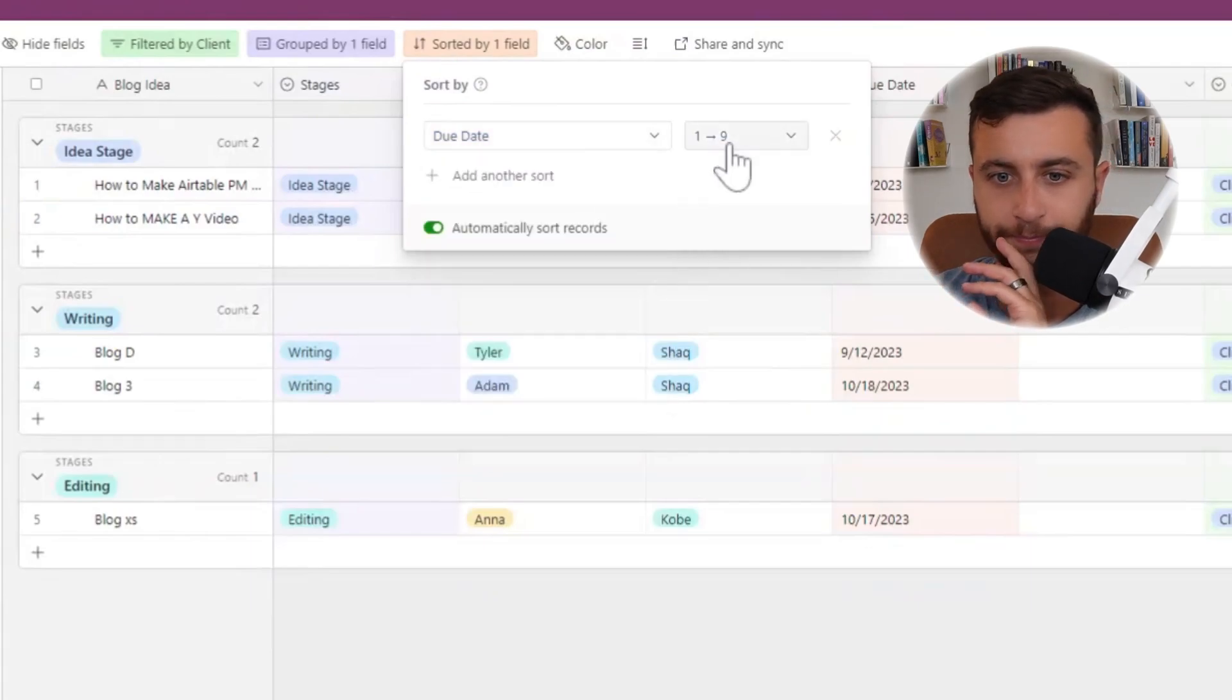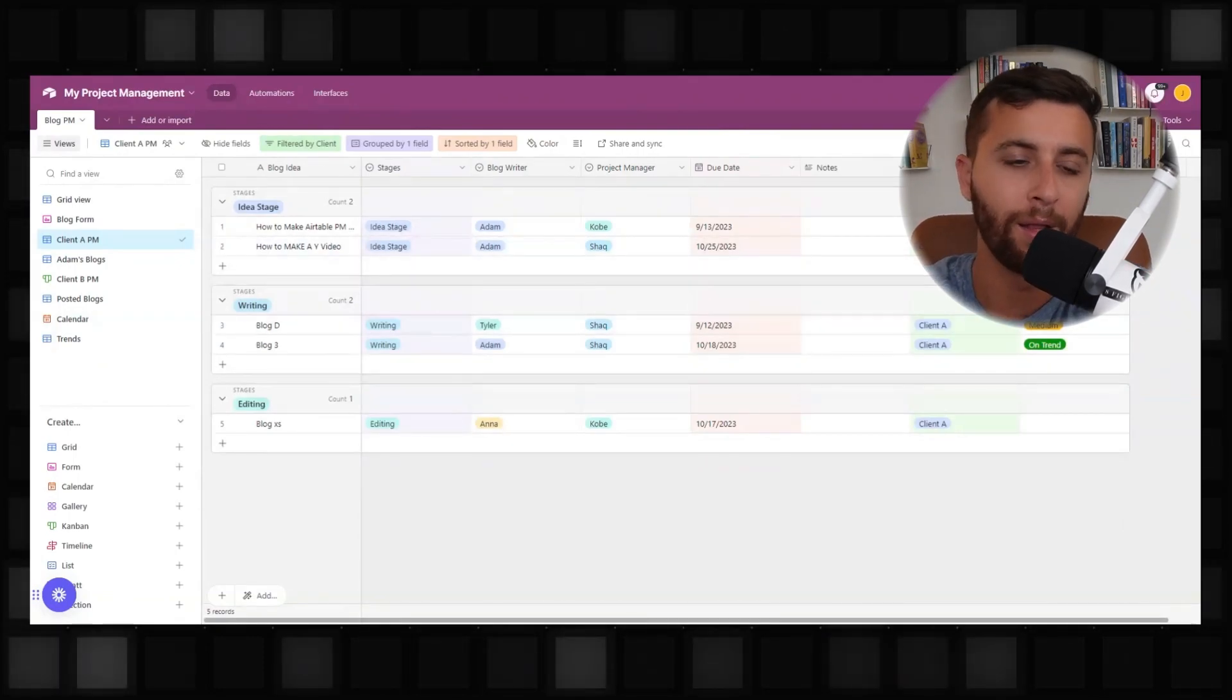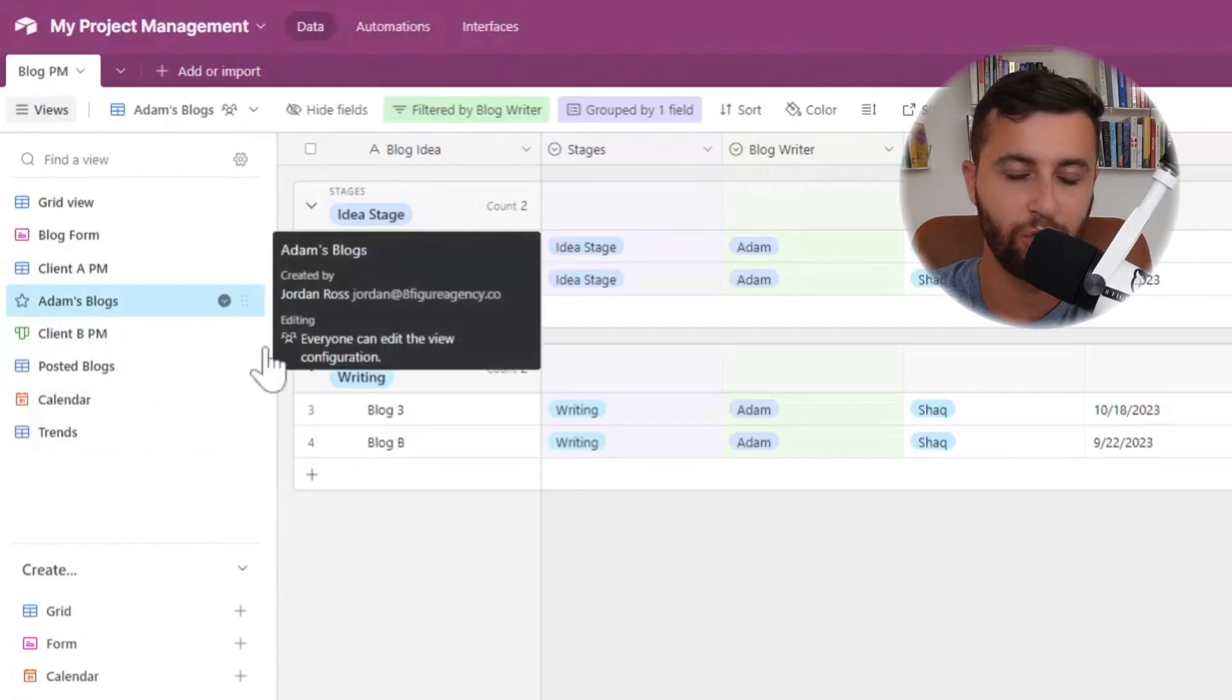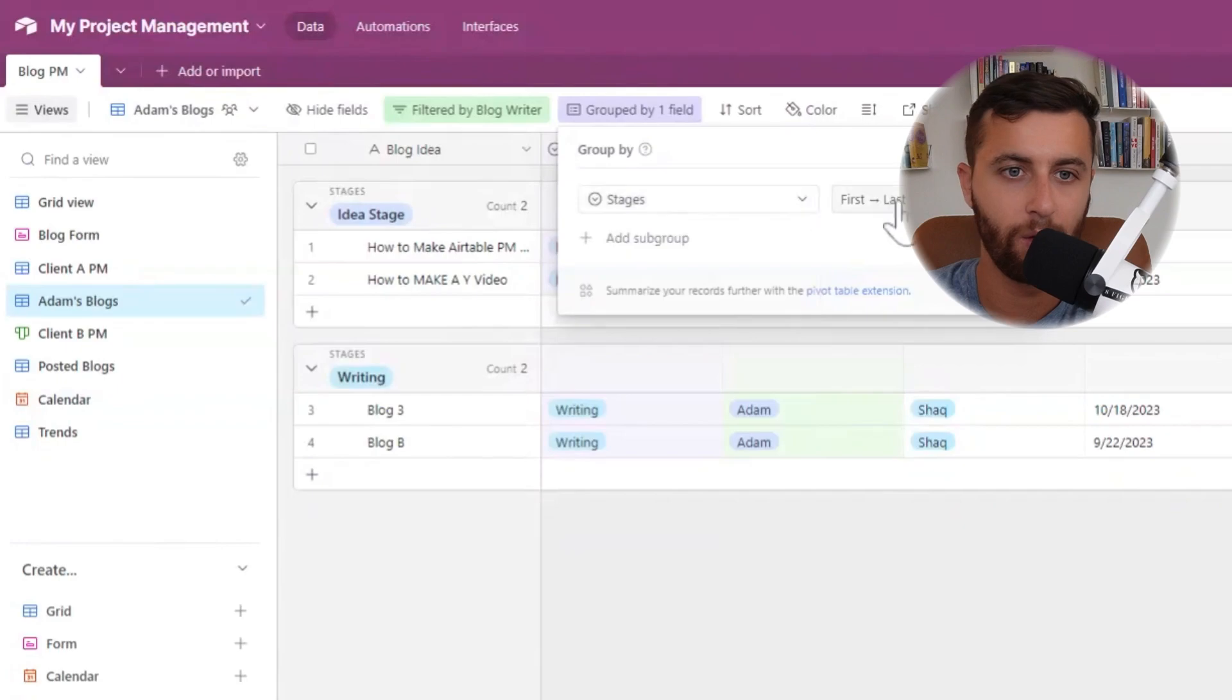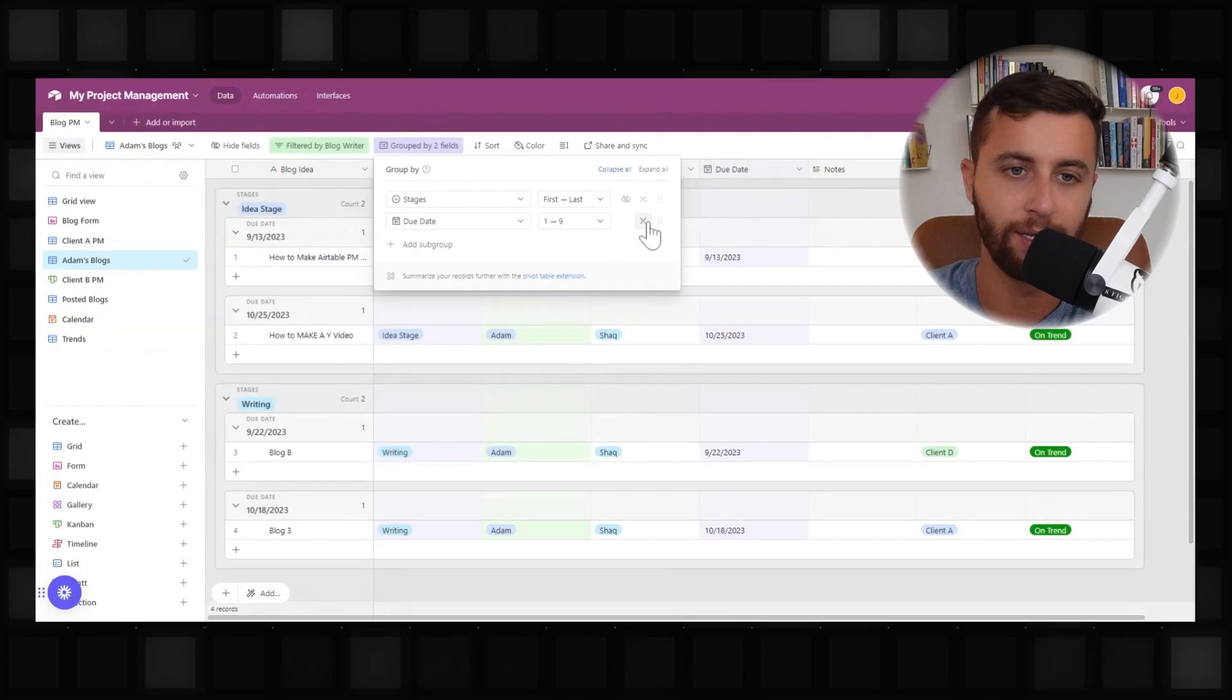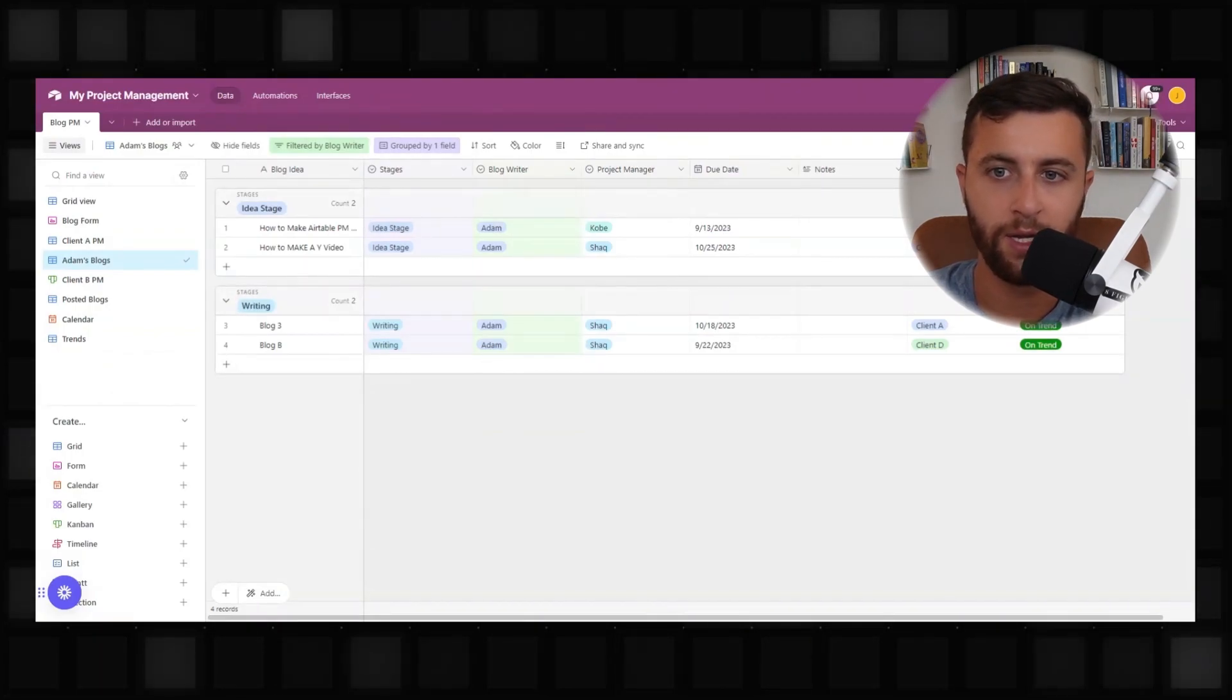So now you could start to see how if you have 10, 20, 30 clients, it starts to become a little bit easier by adding these filters and views for your project management because it allows you to stay organized by not getting too run off course. Now going back to the same process, if I go to Adam's blogs, we're going to filter this, change the condition to the blog writer is Adam. And they're going to group it by stages or you could even group it by due date. You want to see what days things are coming up. So on 9-13, oh, this is in the ideation stage. That's not good. I usually like to group things by due date.